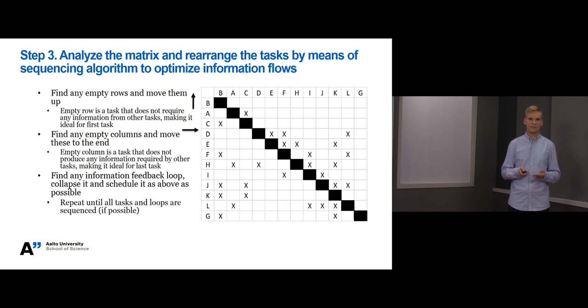Let's practice this together. First we can identify that task C requires information from task B and provides information to task A. In turn, task A is dependent on the information from task C, but task A does not produce information to task C. So we should move task C up before task A.